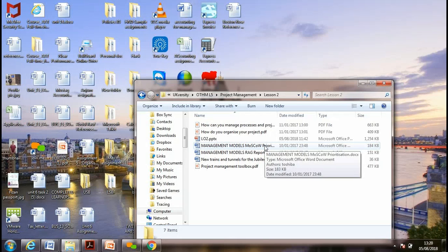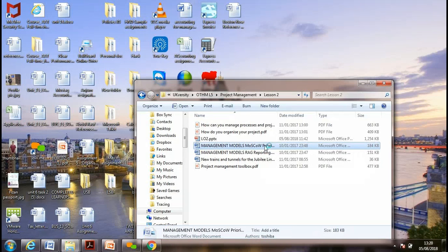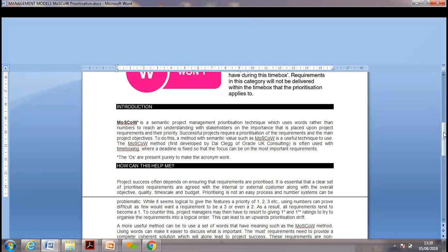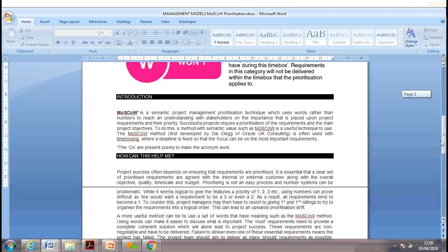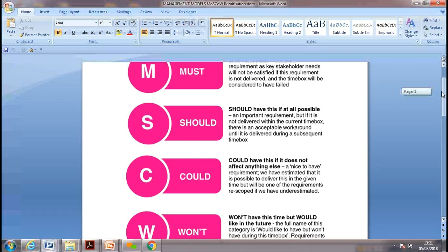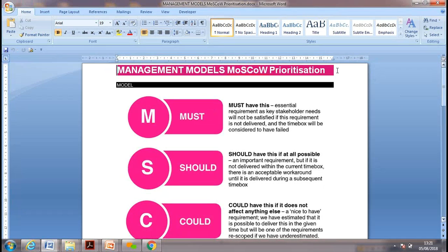These are the planning tools. It's called MoSCoW, that's the model. I'll upload this model as well. When you discuss planning, the underground service in London is a case study of how they made the project. It covers what we must, should, could, and won't do. It's a model to prioritize tasks.